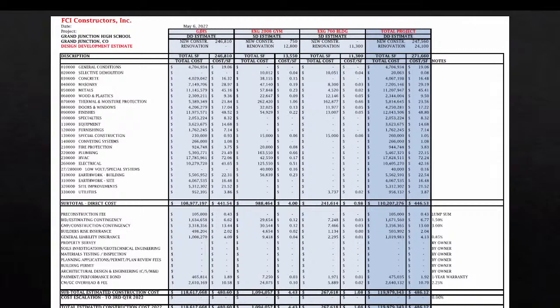Okay. Jason, at what point does that happen? So as soon as we get, for instance, our next bid package, which came out a week ago today, is 100% CDs for foundations and structural steel. Those are the two big ones. And so now we have final drawings. We can put those out to get hard numbers, and so we have another bid package out now for those items.